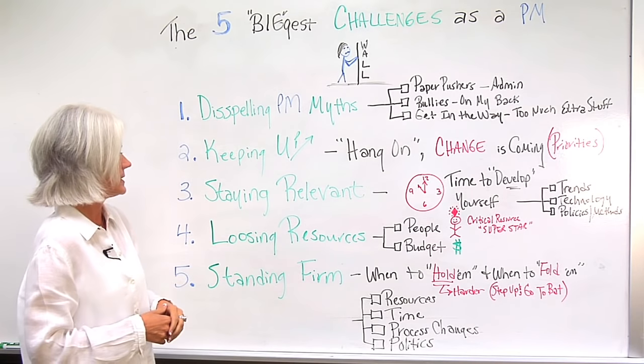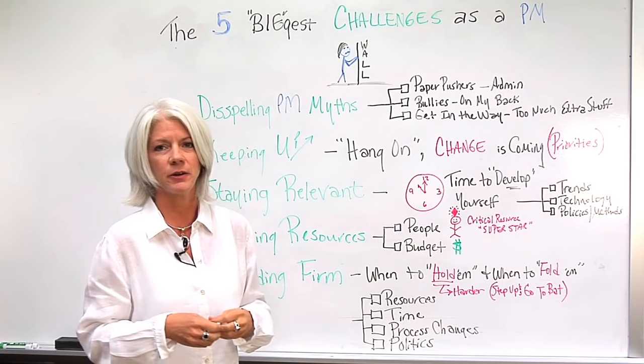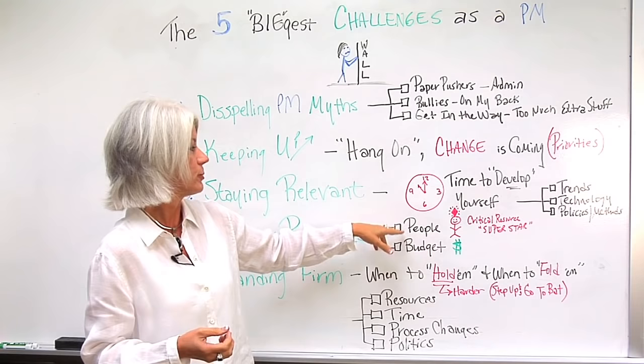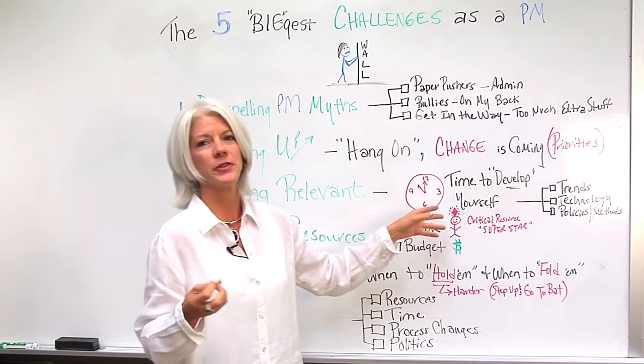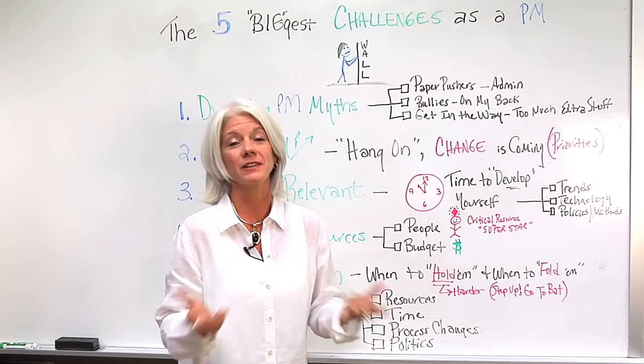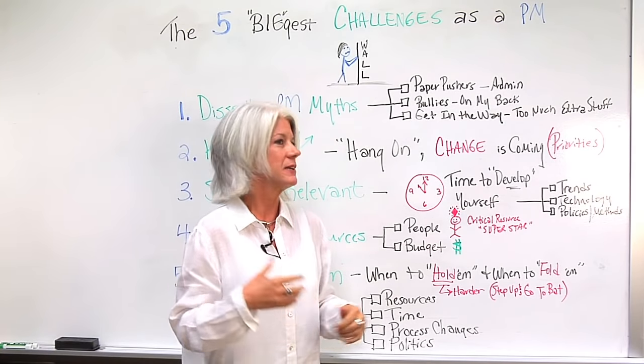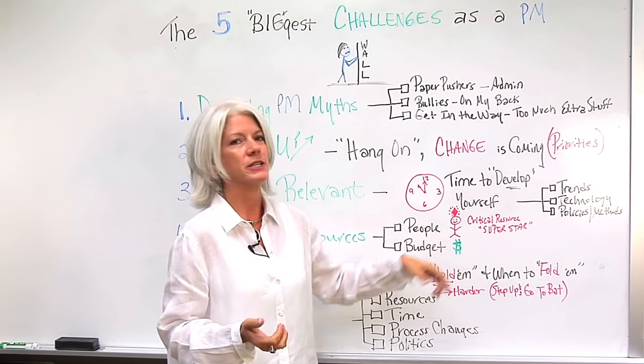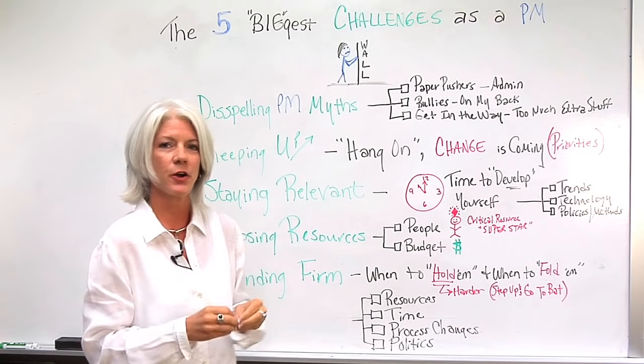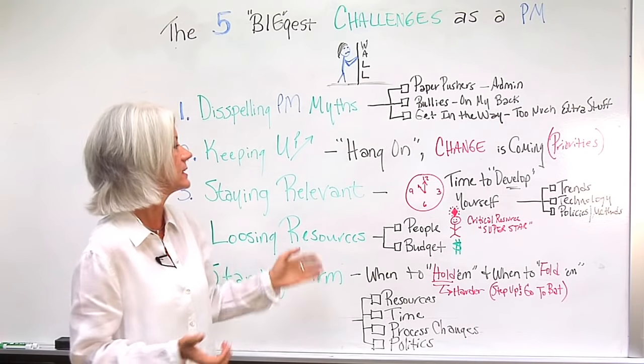Number four is losing resources. As things change and there are higher priority projects, invariably you lose your people or your budget. The critical resource, the superstar on your project that you fear, oh my God, if I lose that person, I am dead in the water. Well, typically we do. And then the budget gets reallocated to other projects. Therefore, you have to go back, reprioritize your work, change it and that's constantly happening.